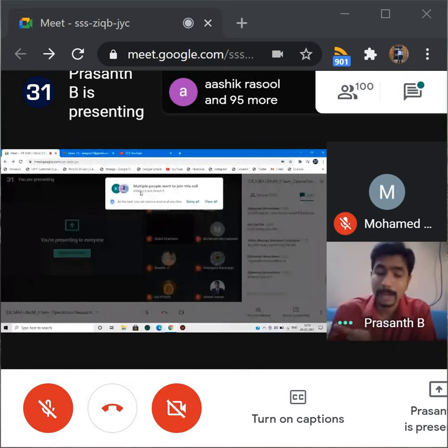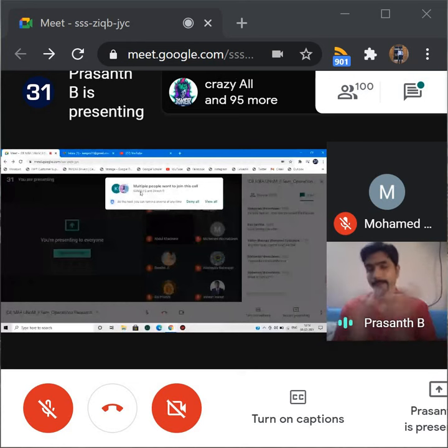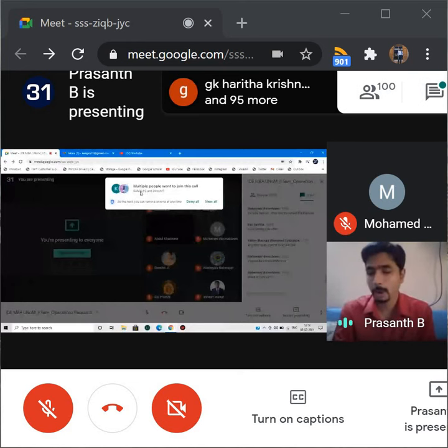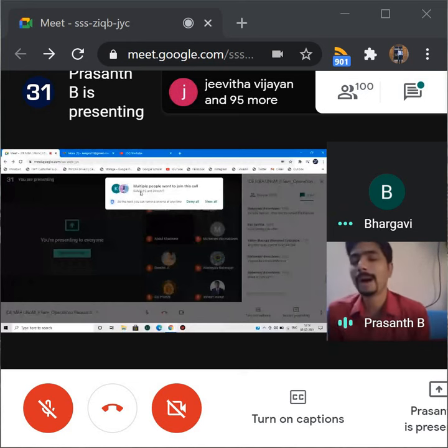What is critical path? Critical path is the longest path. What is the maximum duration which the project is going to take? I can't explain it fully now; when I take the problem, it will be more clear. It is the longest path in the activity or network diagram. So you need to draw the network diagram, and that's the longest path. As of now, just remember that critical path is the longest path in the network diagram that has the same forward and backward computation times. So that is what the critical path method is.